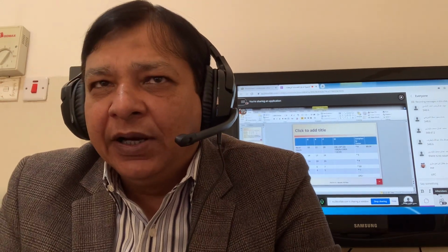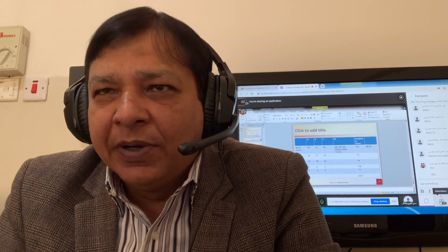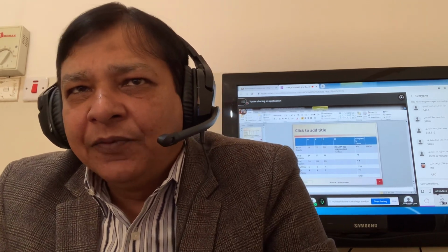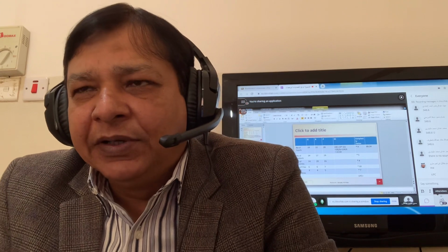This is a typical question in the mid and the final from function point. UFC is unadjusted function count, which depends on 5 parameters: number of inputs, external outputs, external inquiries, number of logical files, number of interfaces. From the requirements, you will approximately calculate values for inputs: optimistic value, realistic value, pessimistic value. Then for outputs, inquiries, files, and number of interfaces.